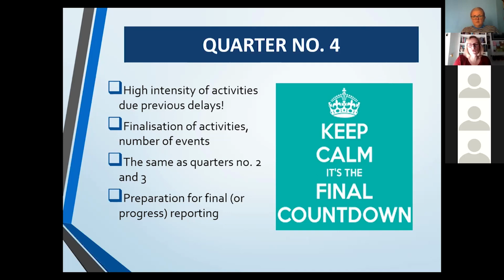If you see that you will have problems respecting the deadlines, then check with the donor. Usually it's possible to extend the time needed for your implementation. Keep in mind that deadlines are important, but the quality of your work is also very important, especially the quality of the services that you are providing to your target group. So if needed, ask for an extension of the project implementation to allow time to work with the target group in the newly renovated premises.